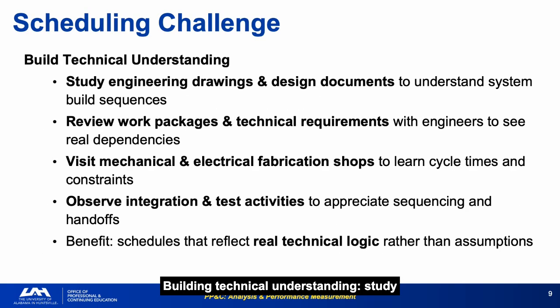Building technical understanding: study engineering drawings, review work packages with engineers, visit fabrication shops to learn cycle times and constraints, observe integration, and test. Visiting the fabrication floor is something most schedulers and analysts never do. It is also the fastest way to develop the ground truth that makes schedule assessment credible.